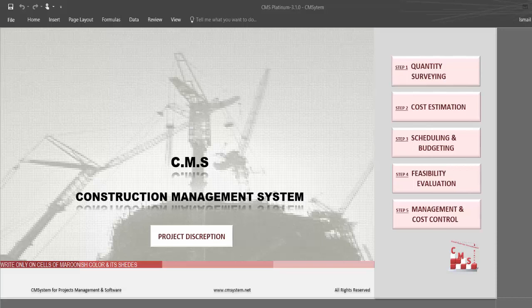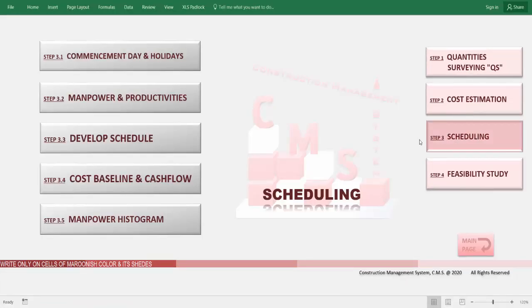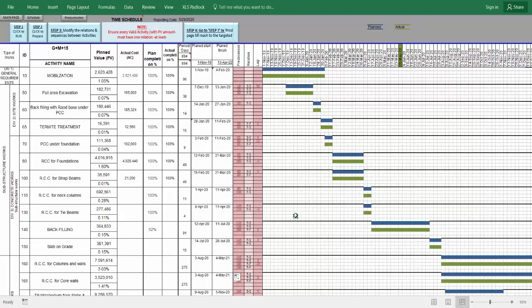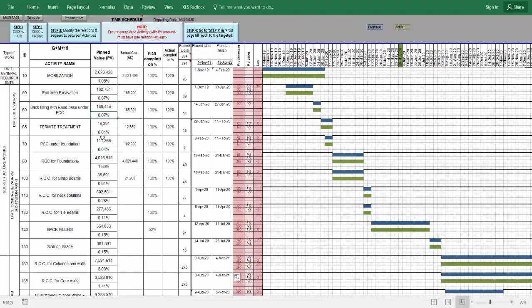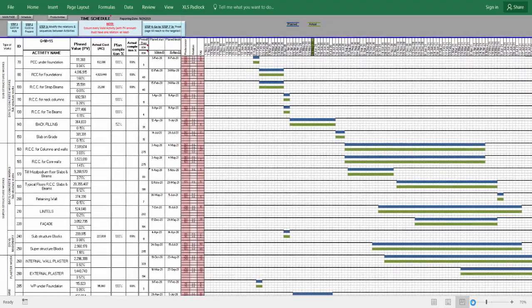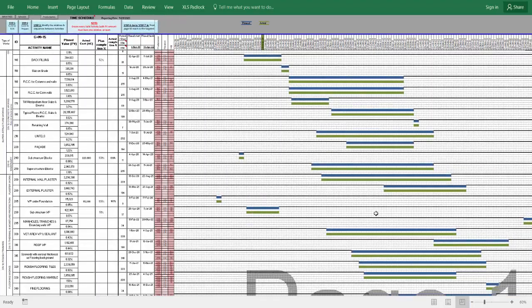CMS can also provide a time schedule and feasibility study automatically. After calculating the budget and detailed price for each activity, CMS uses the logic sequence between activities and common productivities for each manpower type to automatically develop a time schedule. CMS automatically produces a schedule with all activities, planned values, weightage for each activity against the project, the percentage of each activity against project value, duration required, planned start and planned finish for each activity, and a bar chart for all projects. You can also modify the schedule according to your project constraints.